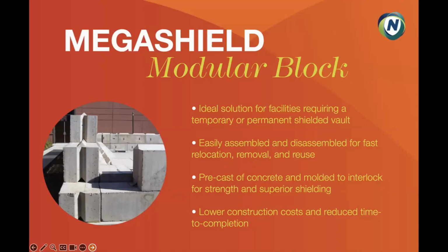And finally, time, because you're not on the critical path, this can all be manufactured and made ready to go, so that, as I said before, one bunker can be installed in as little as 3 to 4 weeks.